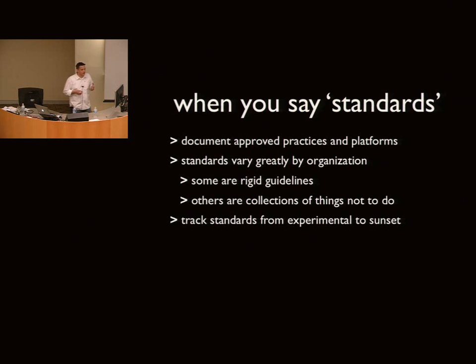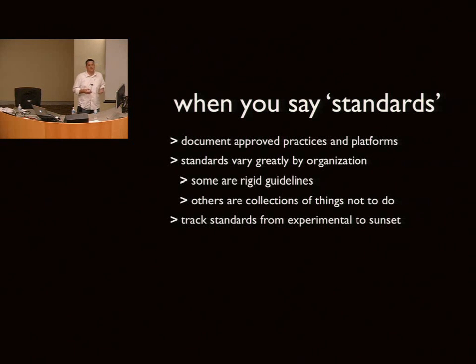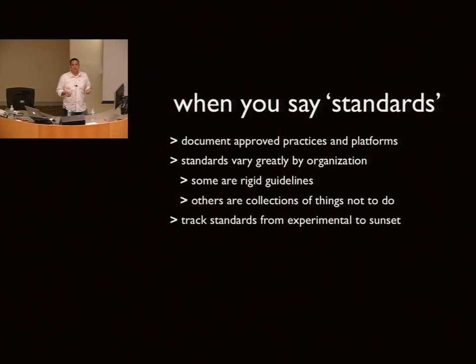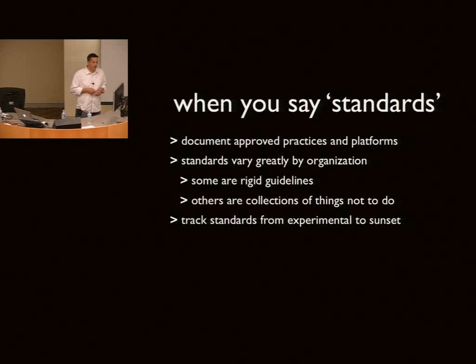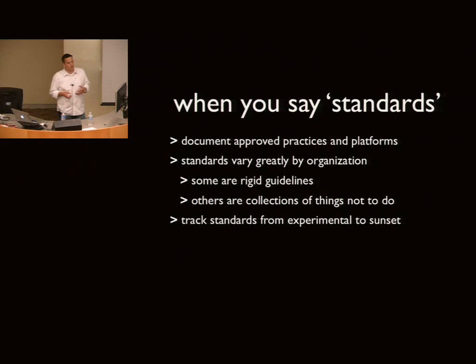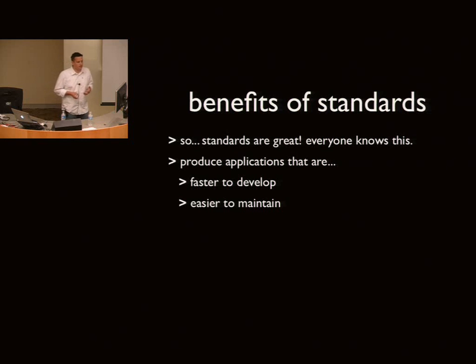But most really good ones track standards through their life cycle at an organization, starting from an experimental standard, through an emerging and an approved or a required standard. And then they also touch on how a standard is sunsetted at an organization. They may give a timeline of when a specific database version is going to be no longer supported. And so those are good things when you're planning out an application to look at. If you develop now on MySQL 4, is that going to be not supported by Q2 of next year? So take a look at those when you start and figure out what you want to do from there.